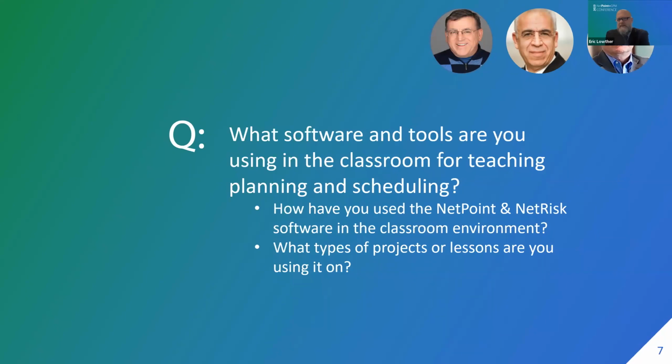Okay. Professor Klanik. Yes, I try to use a variety of tools for the students, like you mentioned before, to give them exposure to different things. In terms of the two undergraduate courses where we've done planning and scheduling, one project is a bridge project consisting of around 45 activities. The other project is a wind farm project where you're installing 5 wind turbine generators and all the infrastructure to support it. I have them plan out the flow of logic for those projects, and then build the CPM schedule using Microsoft Project.